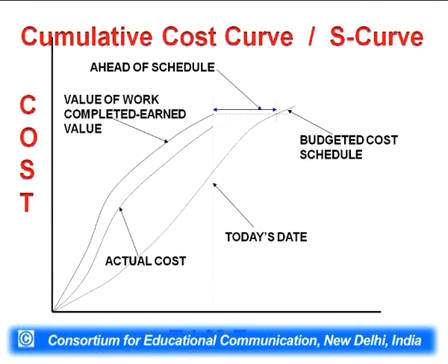We are going ahead of schedule because we have completed jobs worth more money than was budgeted. As compared to the budgeted cost and the jobs to be completed, we are going ahead of schedule by this much intercept time. And this intercept gives us underrun. We are consuming less funds in completing the activities. So this is called underrun. Okay. Here is the way how to tell the management that we are going ahead of schedule, or we are going behind schedule, or we are underrunning or overrunning.